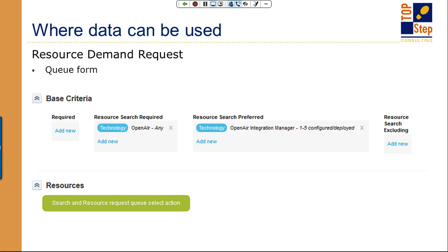Where this works best is when you have somebody in a resource management capacity, or somebodies, if you will. I've worked at a few companies where project managers would get together and review resource requests as a team and figure out what they wanted to do with those. If you have that, then these can be sent to that resource management function, and they have the ability to wade through people's requests versus requireds, different skill sets, and it gives them a really good ability to determine who's needed, and then they can compare that against their availability and make matches and send them out.